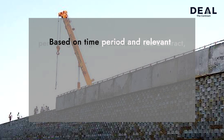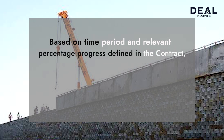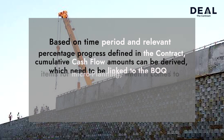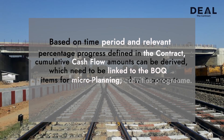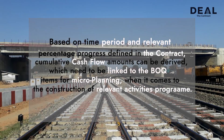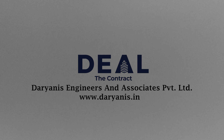Based on the time period and relevant percentage progress defined in the contract, cumulative cash flow amounts can be derived, which need to be linked to the BOQ items for microplanning when it comes to the construction of relevant activities program. In the following videos, we will elaborate more details on other aspects of contract administration. For more details, please visit our website, Daryani's Engineers & Associates Private Limited. Thanks for listening!